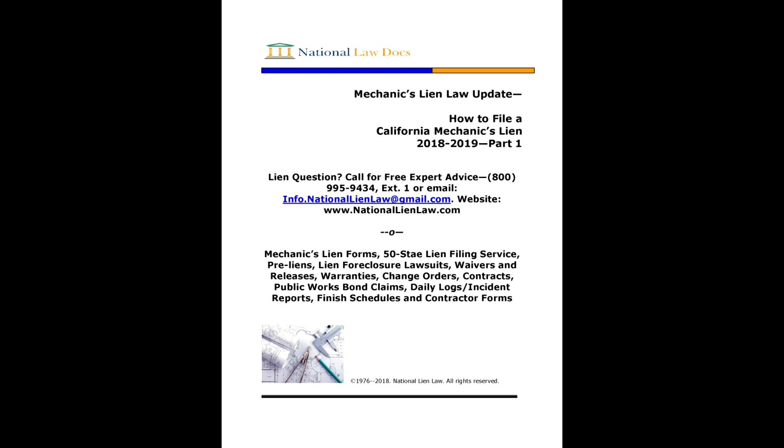As far as punch lists and allegations of deficiencies, the other side can only withhold under industry standards 1.5 times the alleged damages. So again, if you're owed $20,000 and the other side says it will cost $1,000 to correct the punch list, they can only withhold $1,500. They cannot withhold the whole $20,000. Although there's no statute or case law on this, this is usually the rule applied by arbitrators.